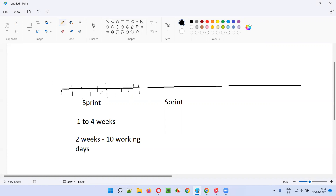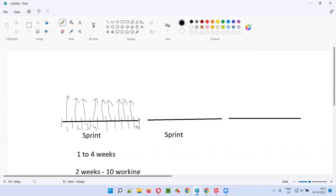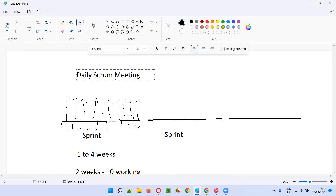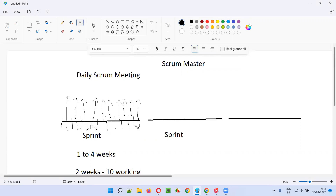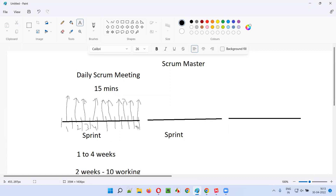While the sprint is going on, every day at the same time and same place, a meeting is conducted for 15 minutes — from day one all the way to the last day of the sprint. That meeting is called the daily scrum meeting. The scrum master is the role responsible for conducting this daily scrum meeting.